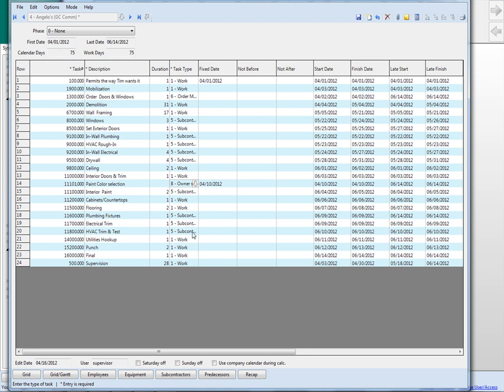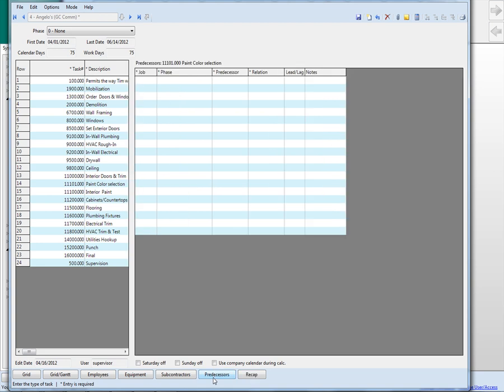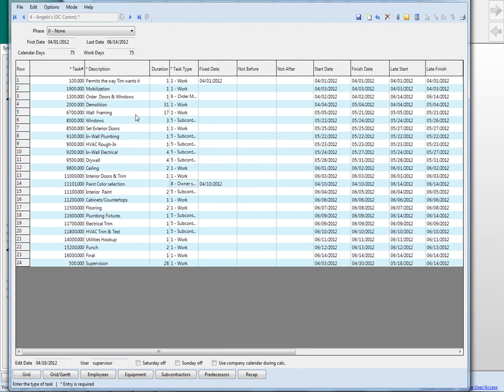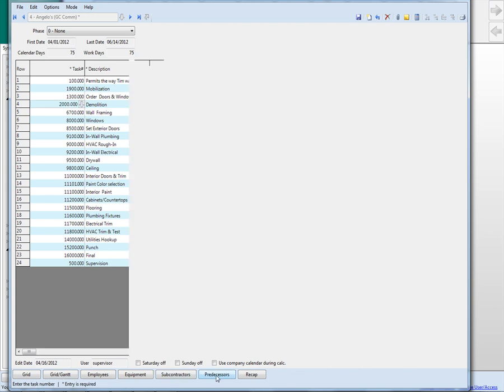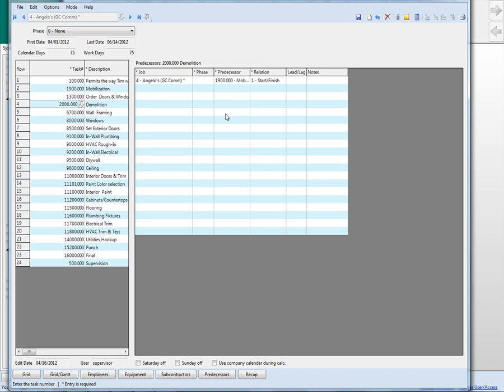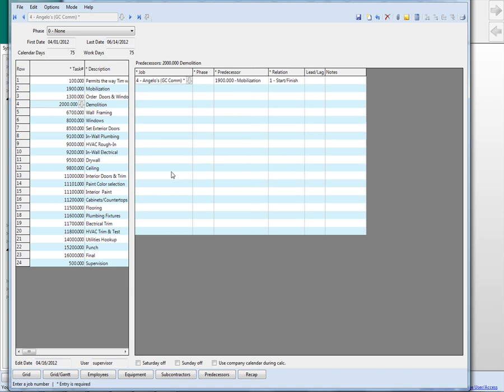So this is how you do it. And then similar to a project. Go back to this one right here. There's a predecessor item. We can't start that until the mobilization is done. So very similar to a project, but not as difficult to use.